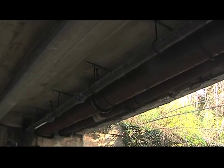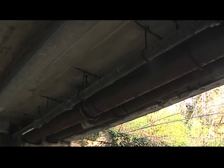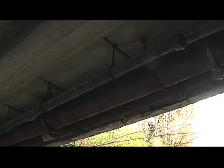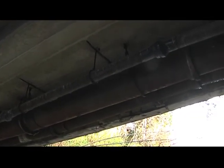That's pretty old for a bridge, huh? Right, it is. Okay. Well, why can't you start work on this bridge right away? The City of Durham has 2 water lines that are attached to the underside of this bridge. There's a 12-inch line and a 20-inch line. And we can't remove the existing bridge until the water lines are out of service.